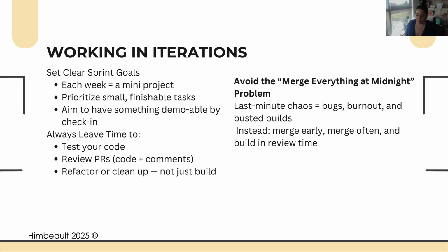In fact, my recommendation for most groups is that they actually set a cutoff date of when they're going to merge everything working in, and then they can spend the last 3-4 days of the iteration cleaning up their tech debt. Because cleaning up tech debt does not change functionality. So you get all your new functionality in the first week or 2 weeks or whatever it is, and then you spend the final week doing merges into main, not into a side branch or anything, merging your code into main through merge requests, but they're all refactors, they're all tech debt related, so that you have nice clean code, you have a good test suite that you know already made sure that you're not going to break your code with your refactors, right? We can set up this really beautiful working system.